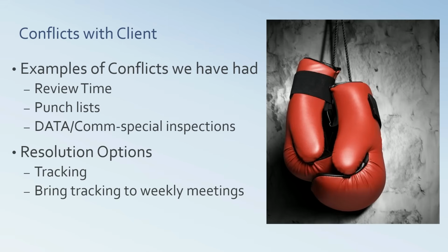You're also there, however, to protect the employer that you work for and the contractor, whether it's a subcontractor or a general contractor. If your contractor is doing things per plans and specs and it's in per contract, they can't require more. They can ask for more and pay for it. Absolutely. And add time and money. But part of your job, though, is to stick up and say, this is in per contract. There's nothing wrong with this end product.